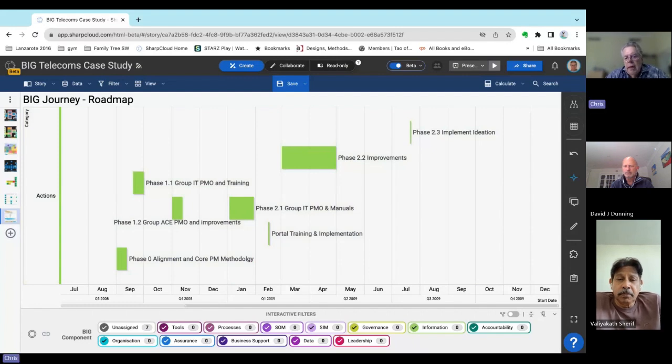I think key to that was just going in steps and making sure that we got first level of maturity in place, and then test out in each of these. We put some stuff together and then we tested it with a smaller group, and if that worked okay and whatever we learned from that, we implement those improvements and then roll it out to the rest of that group within that phase.